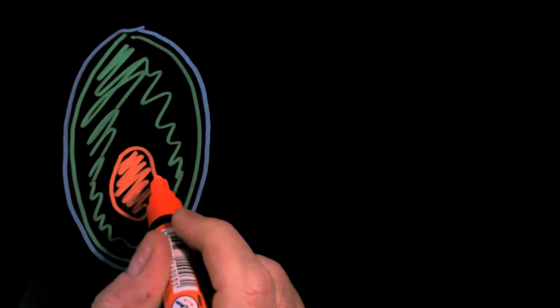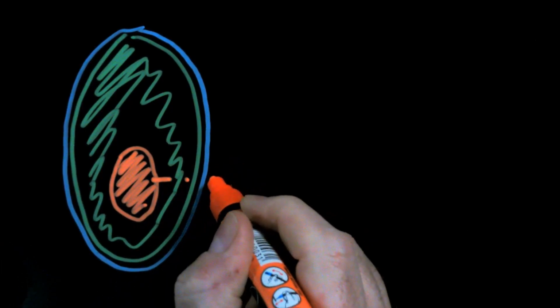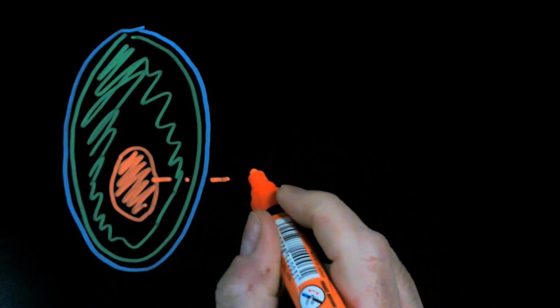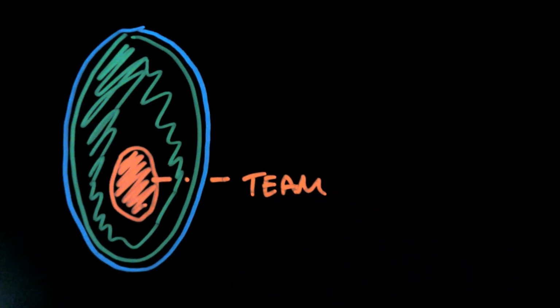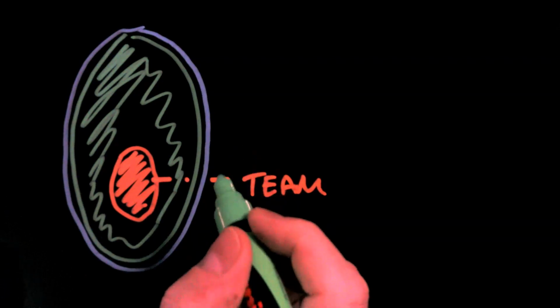Now, in the center of the avocado is the pip. I look at this as being the team level of impediment. Within the team level of impediment, about 90% of team impediments are things that they've got full control over resolving themselves. They don't need any outside assistance. They don't have any dependencies, things like that. So this team is able to identify and also resolve the problem that they've identified.